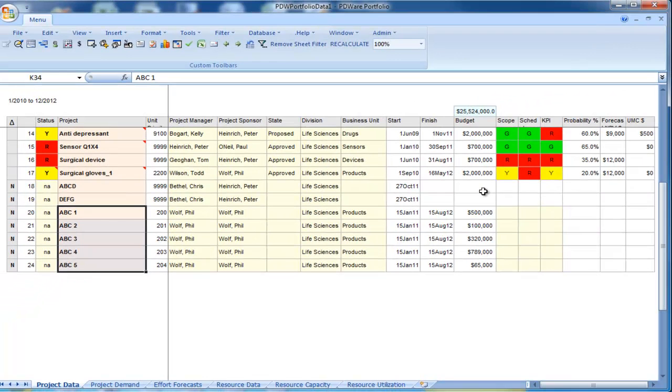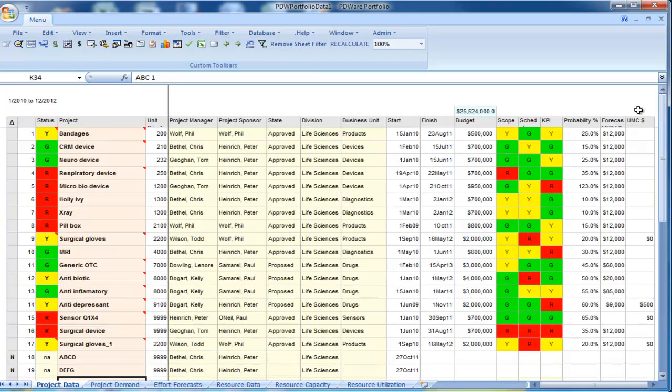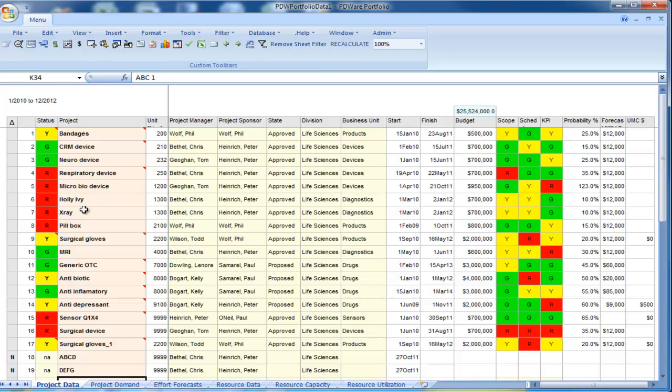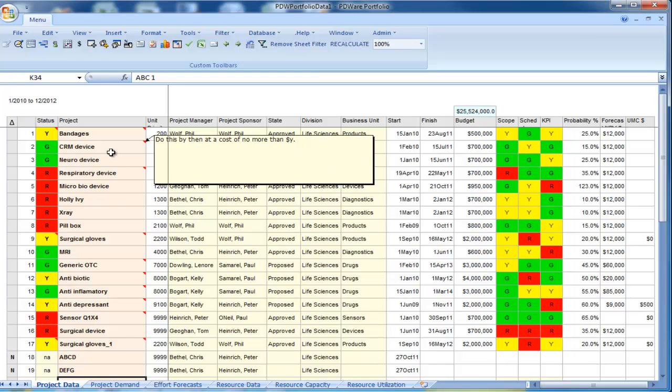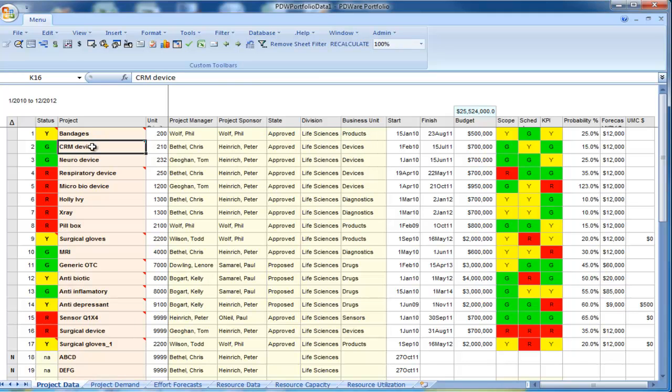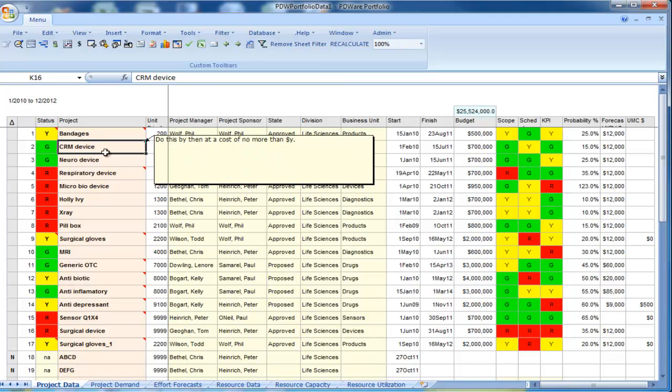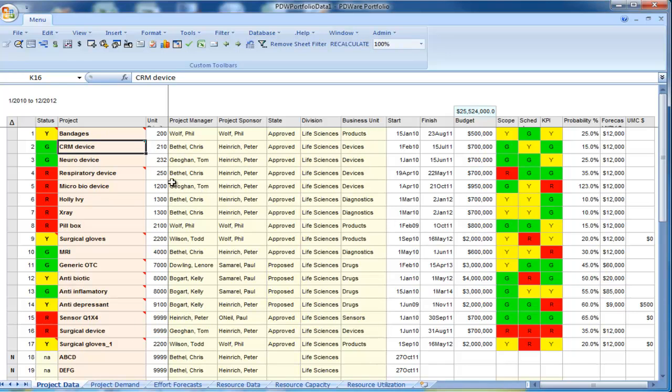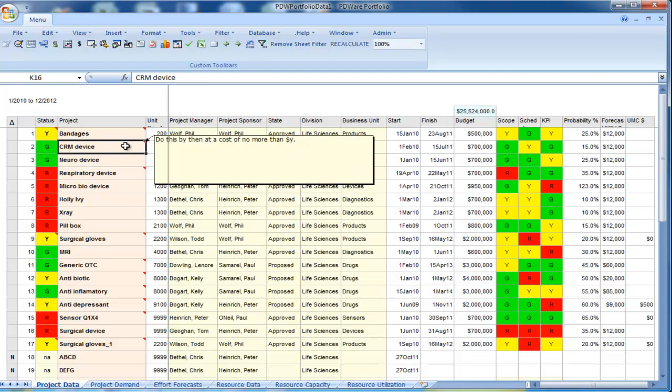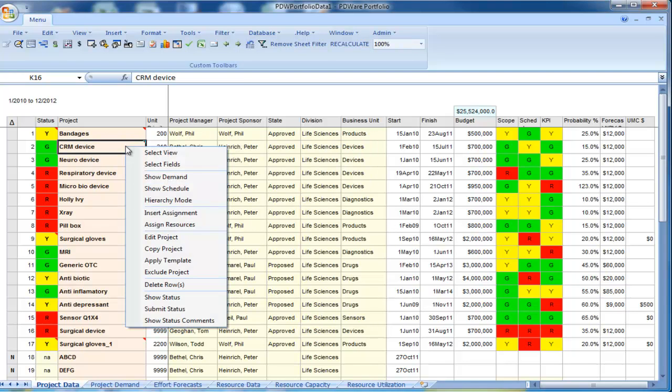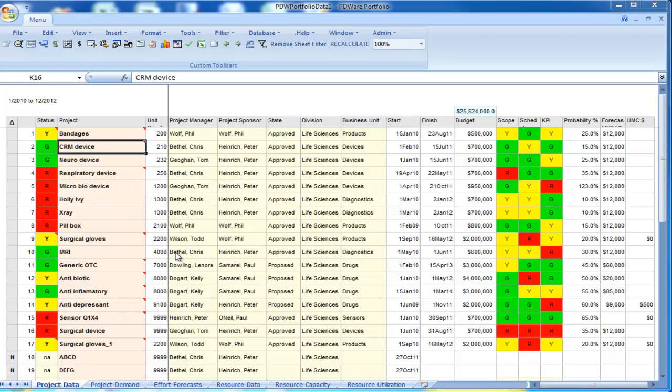The third way for creating or adding projects to the project registry is to take one or more projects that you already have, that have data in them, for instance schedule data and even a resource plan, and simply copy them. So I am going to make a copy of the CRM device project. I right-click, select Copy Project.